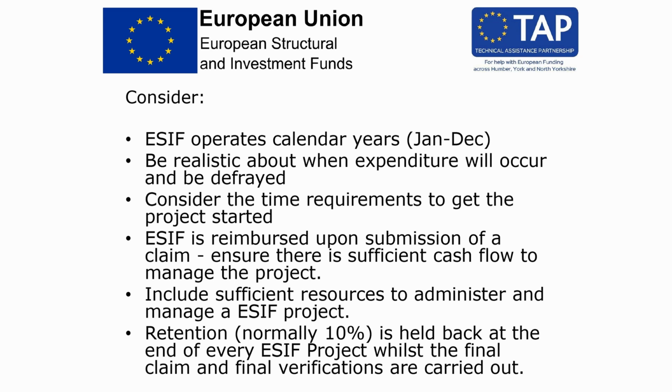Consider carefully the time requirement to get the project started. Will it be necessary to factor in time for recruitment, procurement and formalising a partnership? Most projects spend very little in their first couple of quarters. European structural investment funds are reimbursed upon submission of a claim. The applicant must ensure there is sufficient cash flow to manage the project.